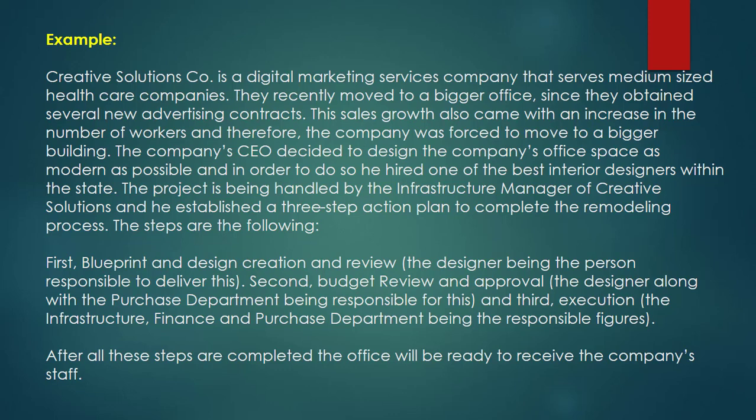First, blueprint and design creation and review, the designer being the person responsible to deliver this. Second, budget review and approval, the designer along with the purchase department being responsible for this. And third, execution, the infrastructure, finance and purchase departments being the responsible figures.